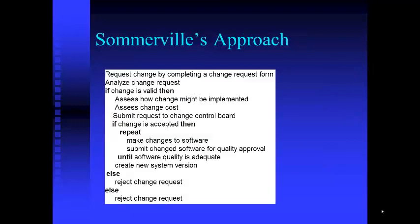Somerville has a humorous approach written out in pseudocode: request a change by completing a change request form, analyze the change request, if the change is valid then assess how it might be implemented, assess change cost, submit request to control board. If accepted, then repeat: make changes to the software, submit changed software for quality approval until software quality is adequate, then create a new system version. If the change is invalid, reject it. If the change doesn't get accepted, reject it.